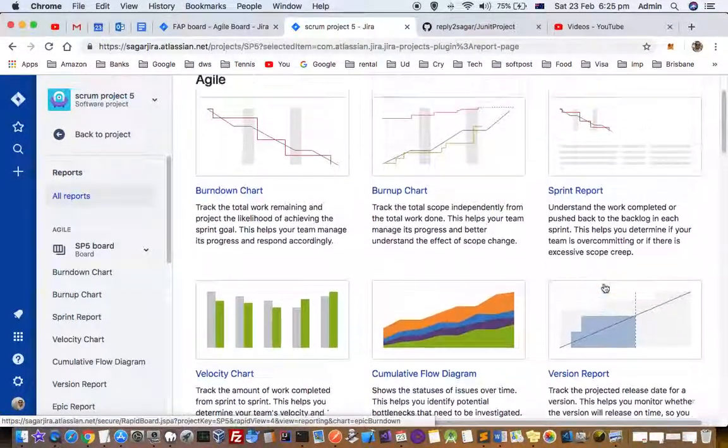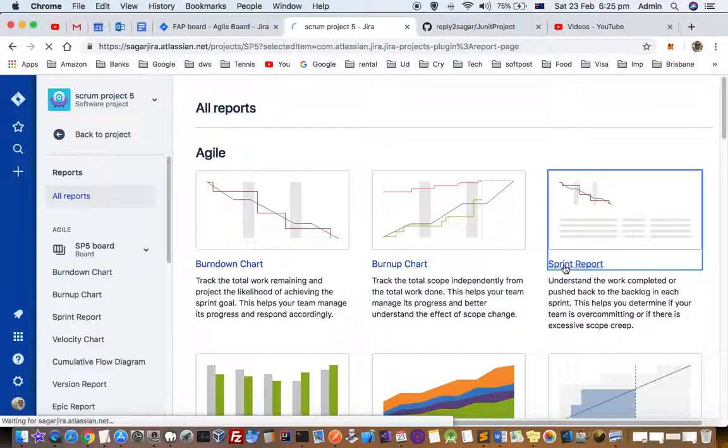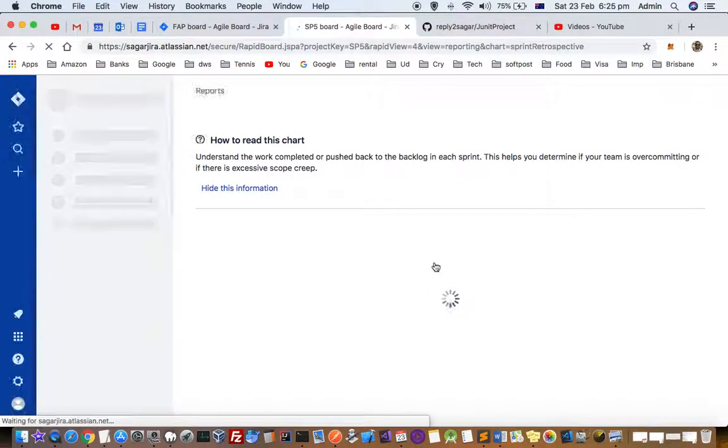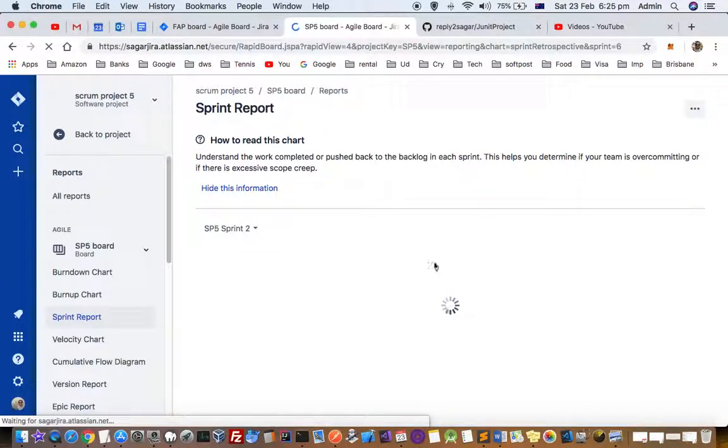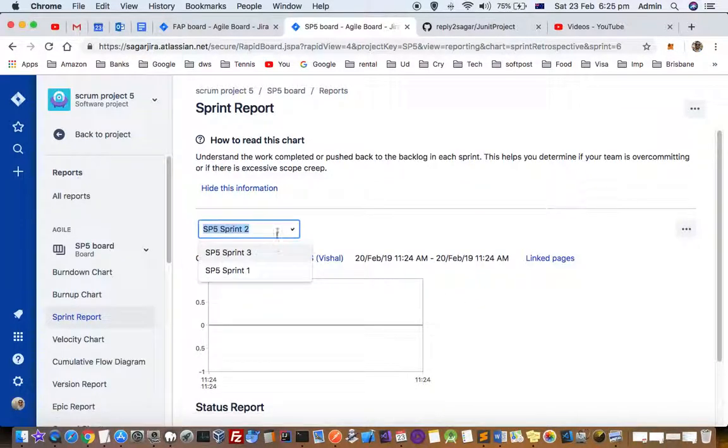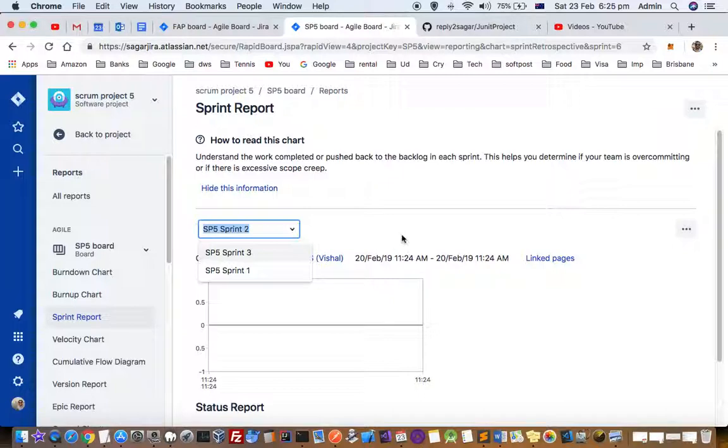Just click on Sprint Report and there you can choose the sprints, and then it will display the report for that sprint. You can see that on this dropdown you can select the specific sprint. There are three sprints that have happened for this particular project, so you can select the sprint there.